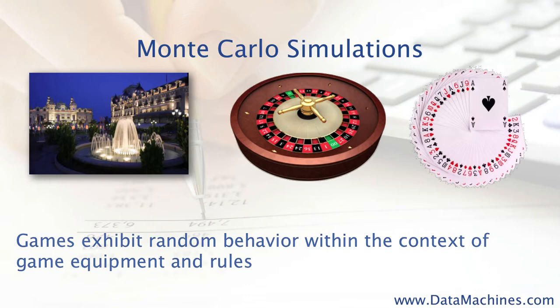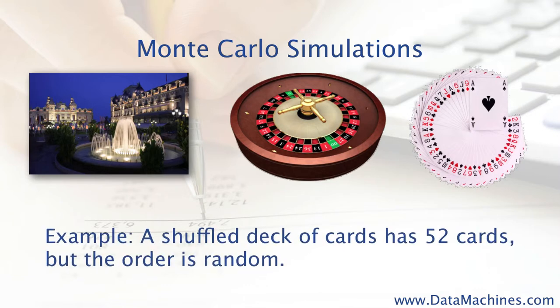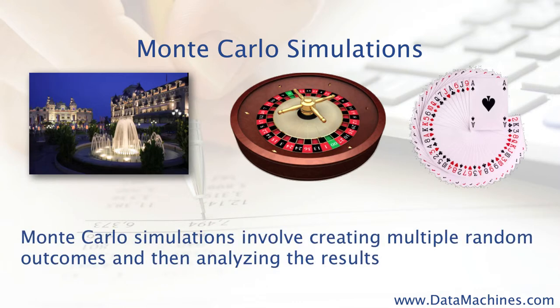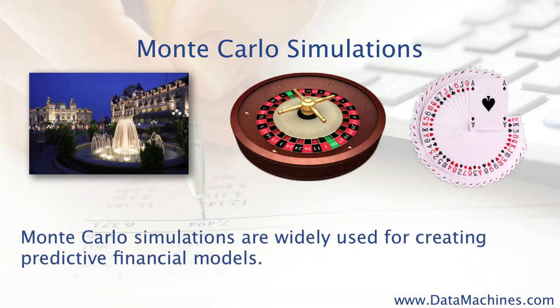Games of chance exhibit random behavior within the context of game equipment and rules. For example, a shuffled deck of cards will contain 52 cards, but the card order will be random. Monte Carlo simulations involve creating multiple random outcomes, usually based on probability distributions, and then statistically analyzing the results. This type of Monte Carlo simulation is widely used in predictive financial modeling.